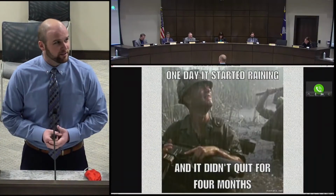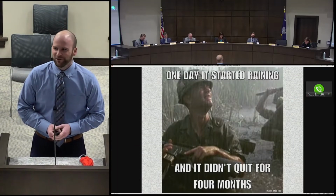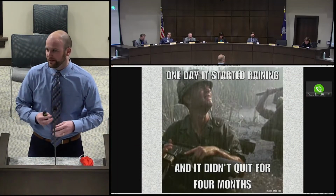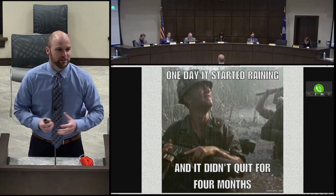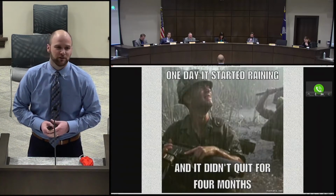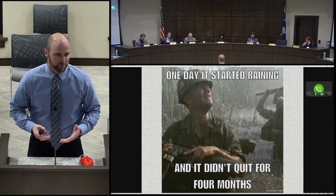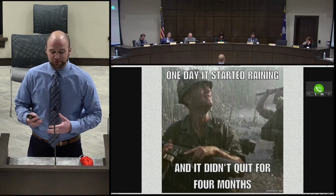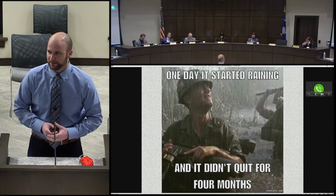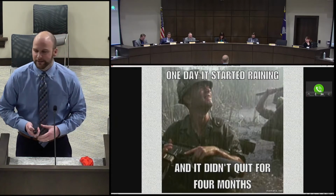It's been raining a little bit lately, if you haven't noticed. So this obviously has had an impact on our projects. For example, this whole week is probably a wash. All the rain today, it's going to take several days to dry out. They're calling for rain again all day Thursday, so now next week's starting to be in jeopardy. When the temperatures only get in the 40s and it's wet, the ground doesn't dry. So it makes it difficult and limits the contractors to what they're able to actually complete and work can get done.